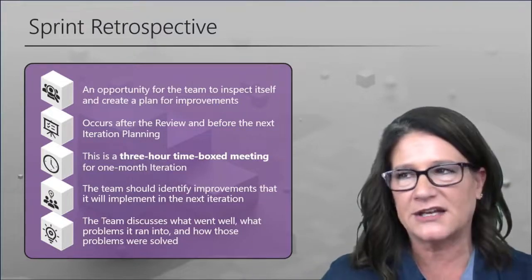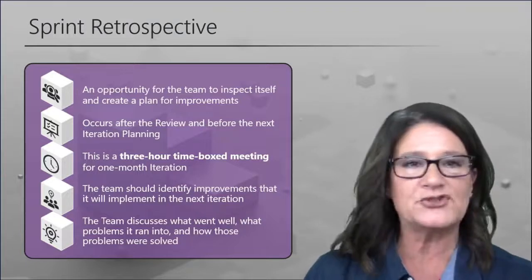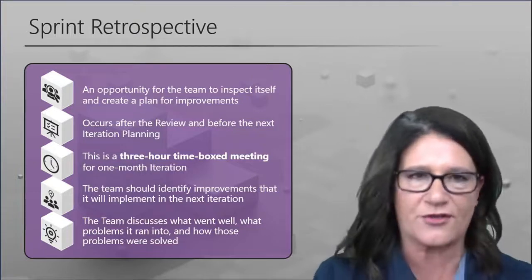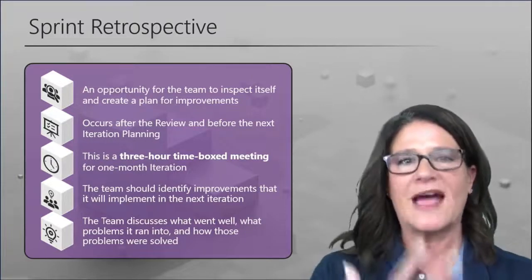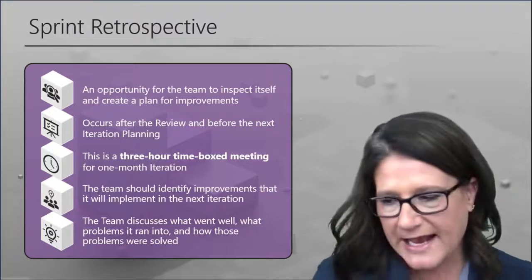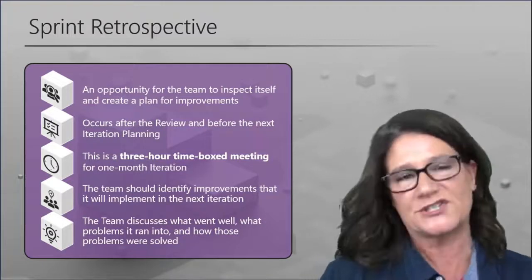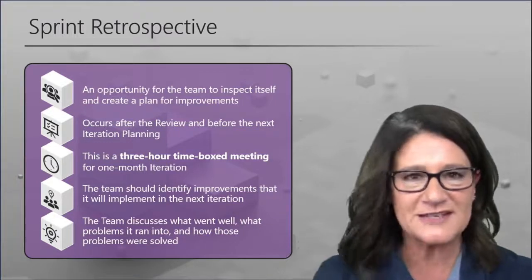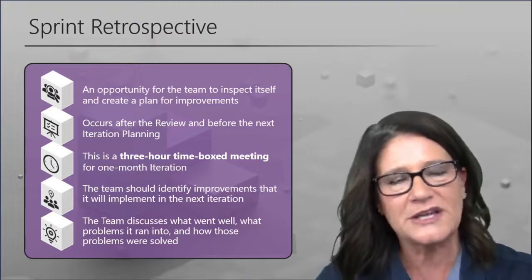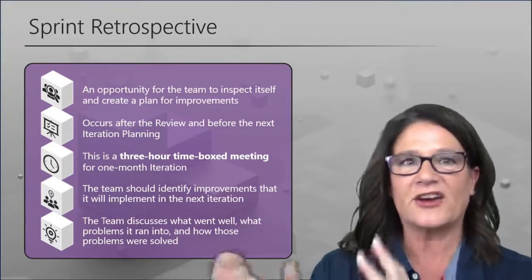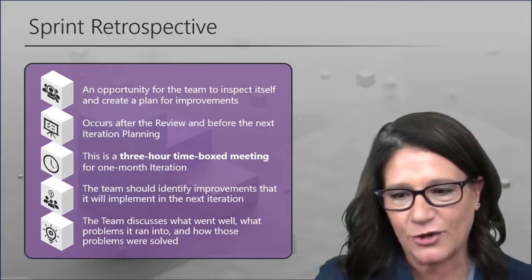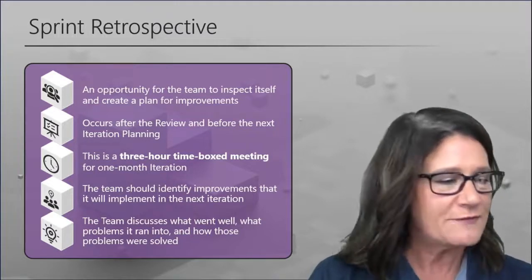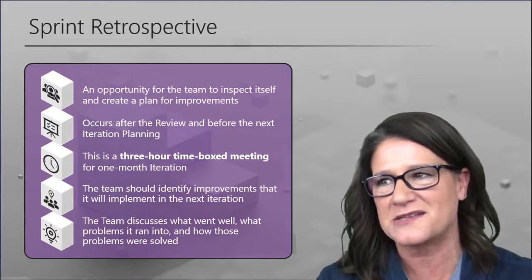Several of you said you do lessons learned. Maybe you document lessons learned throughout or use issue logs. But generally, the thought is that when the project is over, you have a lessons learned meeting — and at that point it's too late. Project's over. Whereas on the Agile side of things, every two weeks a retrospective is happening. There is a meeting to talk about what should we keep doing, what should we stop doing, what should we change. The value of a retrospective is exponential.